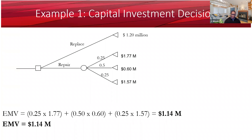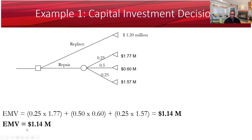EMV, as you can see here, is the weighted average of the possible outcomes multiplied by their probabilities. As you can see on my screen, EMV is not the product of one possible outcome by each probability — it is the sum of the products. The weight here is the probability of each possible outcome. So EMV is 1.14 million.